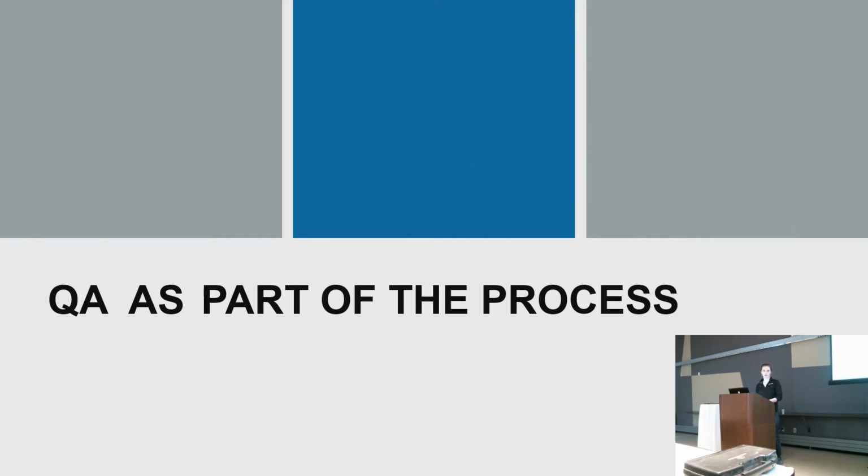If you set up QA with your project properly and efficiently, it's a seamless involvement. For example, if I'm working on a line of work surfaces and it takes me 2-3 weeks to do so, as I'm going along and I complete certain parts, certain features, I'm submitting those and sending them off to QA. And then I'm immediately getting feedback like, this was really good, this was really difficult, this caused another bug, this could be improved this way. And so the overall quality of the product improves during the entire course of its development. And the end product is much better because of it.